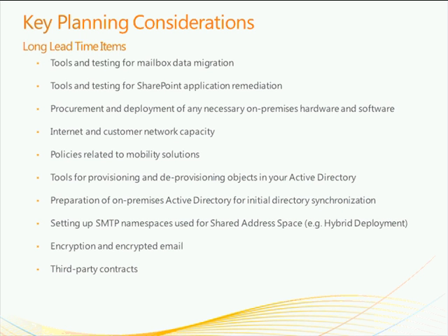AD cleanup is an essential part of some of the deployment options, such as single sign-on and directory synchronization. Those various tasks can involve different groups throughout your organization, and it's necessary that you plan ahead so that it doesn't come up later and drastically delay your project.